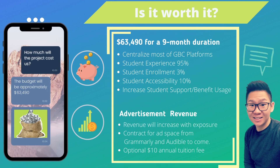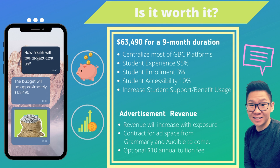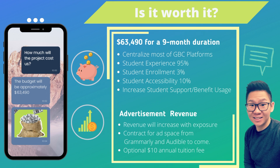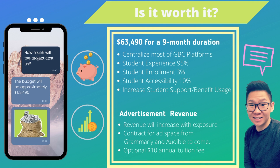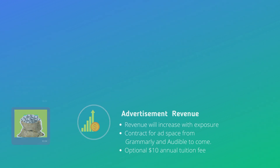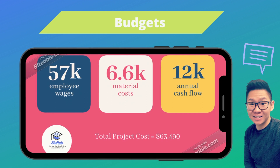The total cost of the project is estimated to be $63,490 for a nine-month duration. The StuHub app will help centralize most of GBC's platforms, and our team really wanted to focus on increasing student experience, enrollment rates, accessibility, and overall usage of student benefits. In order to recuperate this cost, our application will have integrated advertising space that will bring in monthly revenue. Currently, we have contract agreements in the works with Grammarly and Audible, and revenue will only grow with more exposure. Additionally, a $10 annual tuition fee will be optional for students to help our cause. The breakdown: $57,000 will be allocated to employee wages, $6,600 to material costs, and $12,000 will be your annual cash flow, with a projected cost of $63,490.